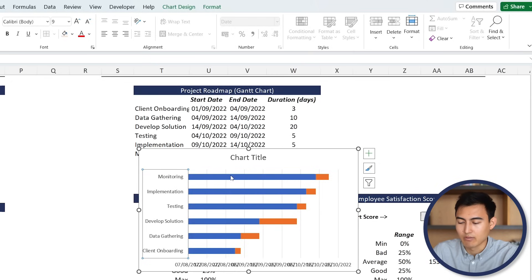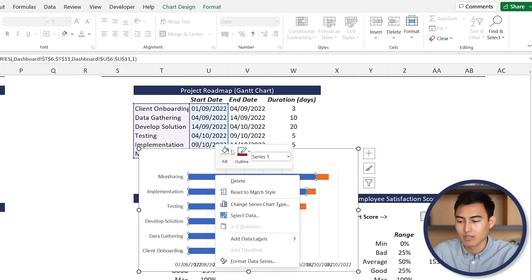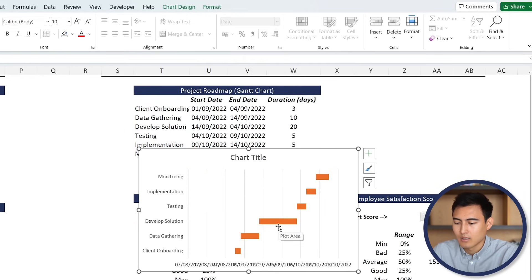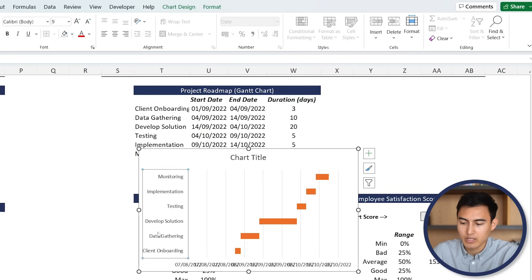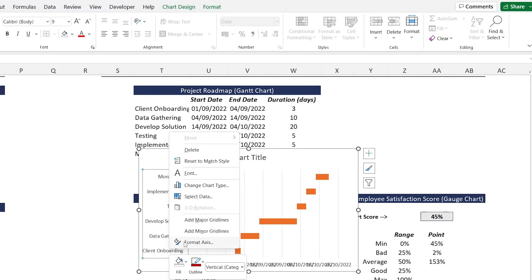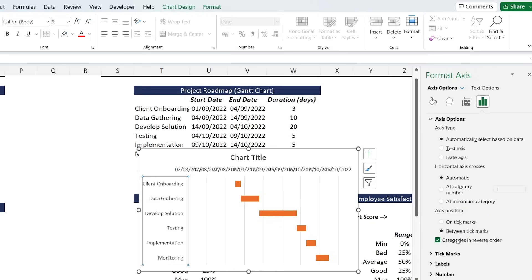Now let's work on some formatting. The blue bars on the left we don't want - we only want the orange ones, which represent the actual duration days. So right-click on the blue bars, go to Fill, and select No Fill. Now we need to invert the order: client onboarding should be at the top as it's the first task. Go to Right Click, Format Axis, and towards the bottom find Categories in Reverse Order. Click on that and it's looking better.